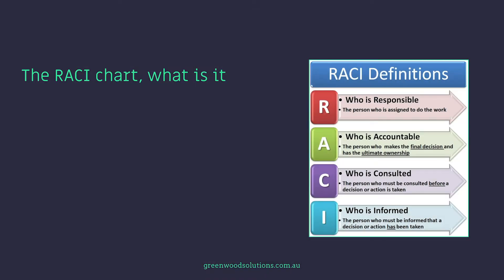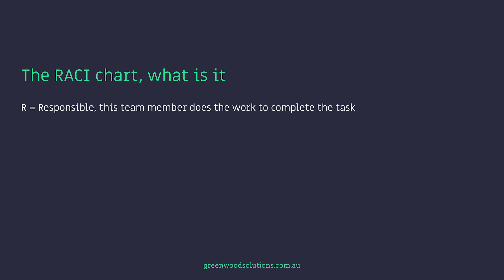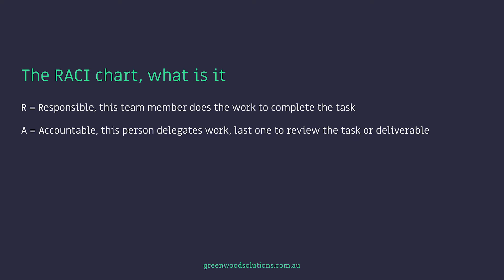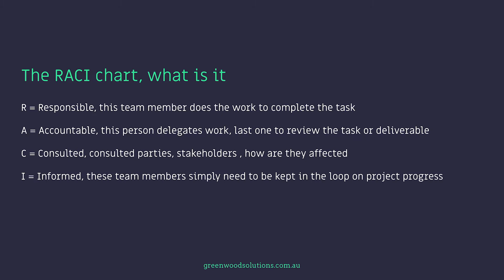Now, we're going to talk RACI. What does RACI mean? The R stands for Responsible — this team member does the work to complete the task. The A is Accountable — this person delegates the work and is the last one to review the task or deliverable. C is Consulted — that's a consulted party, whether it's the stakeholders and how they are affected. I stands for Informed — these team members simply need to be kept in the loop on project progress, but they don't need all the information. Multiple people can be responsible, but there can only be one entity or person accountable. Many people are consulted and fewer are informed. You can also be both accountable and responsible — that's an important point to make.